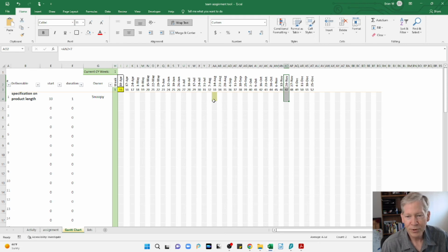This gives you an opportunity to look by the owner, to, again, work with individuals on the team to say, you say you're going to start here and here, but you've scheduled everything to happen the last week of the quarter. A lot of people like to do that. They think, okay, well, it doesn't need to be done until the end of the quarter, so I'm just going to schedule everything the last week of the quarter. And if you look at this, you'll see they scheduled themselves 9 days of work to get done in 1 week.